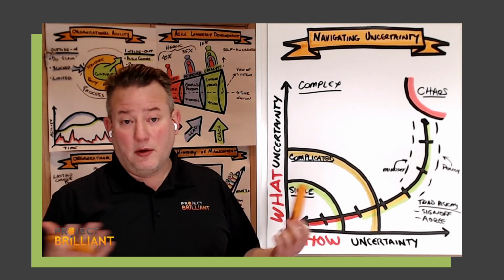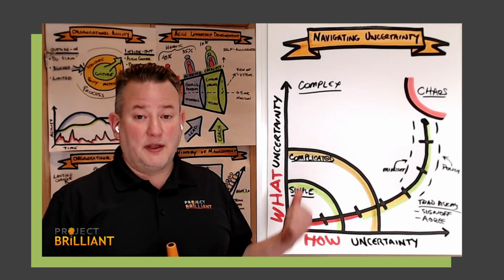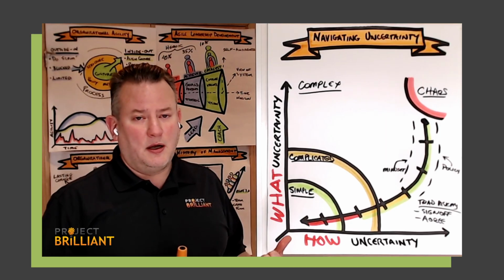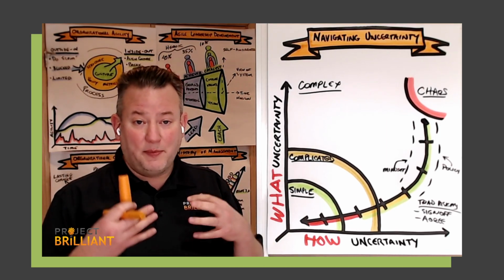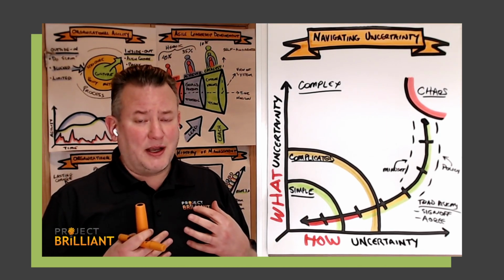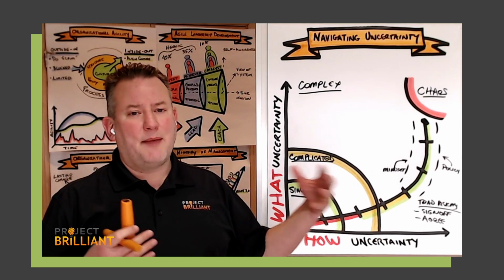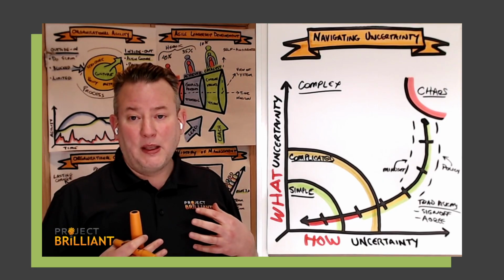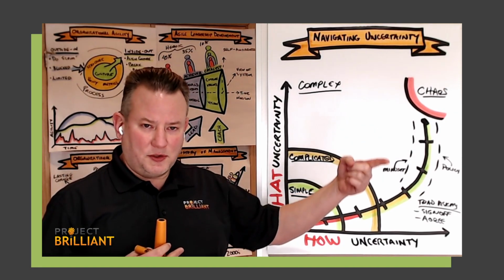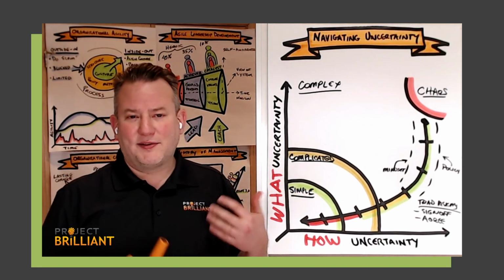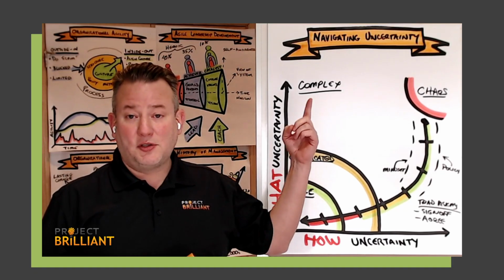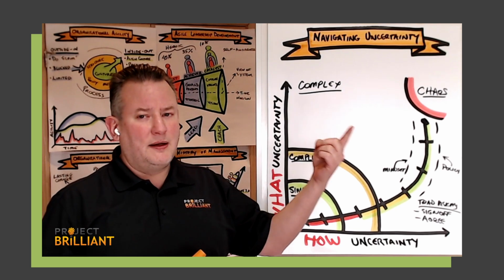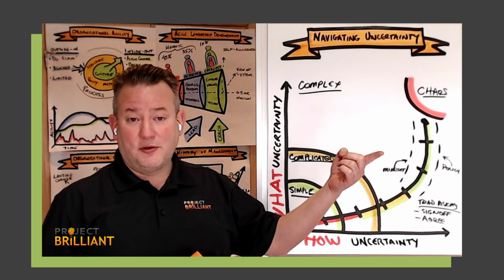And the answer, of course, is no, right? We haven't really discovered that that's what the customer needs, and we haven't really discovered that that's how we should build the solution. All we've done is come to agreement internally inside of our bubble, right? And that's a very risky situation, actually. We feel like we're reducing risk, but what's happening is we're creating more risk by making assumptions and then pretending that we've validated them. And so, unfortunately, this approach to traditional project delivery is very risky if you're in a complex environment where things are changing. That could work well in a simple environment, but if we're in a complex environment, nailing things down up front can be very dangerous, right?